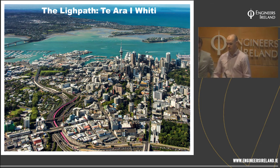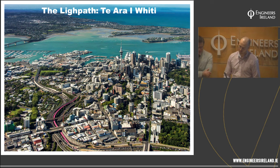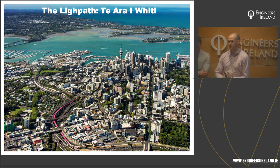This is something that we discussed with the Auckland Motorway Authority, so we've involved them. The Auckland Motorway Authority, who will be the asset owners and managers, we pretty much met them every 2 weeks throughout the whole project and went through the design with them, and they were happy with it. But the screens themselves are open aspect, so it will get dirty on the outside, but it will be more inclined to get dirt on the inside, such as birds landing on them.